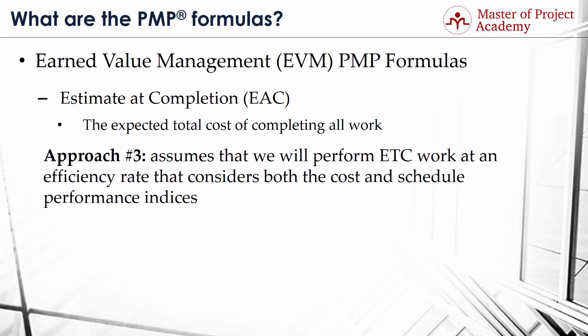Approach 3 assumes that ETC work will be performed at an efficiency rate that considers both the cost and schedule performance indices. Accordingly, its formula is: EAC equals the result of BAC minus EV, divided by the result of CPI times SPI, all plus AC.